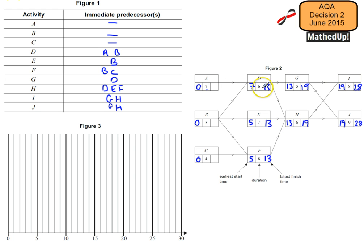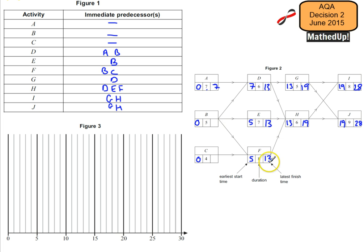Going back, A needs to finish at the latest by 7 minutes, otherwise it's going to delay D - there's no float there. Then 13 minus 6 is 7, 13 minus 7 is 6, and 13 minus 8 is 5. So the latest that C can finish is after 5 minutes, otherwise it will delay F. And similarly, B's latest finish is after 5 minutes, otherwise it will delay F.